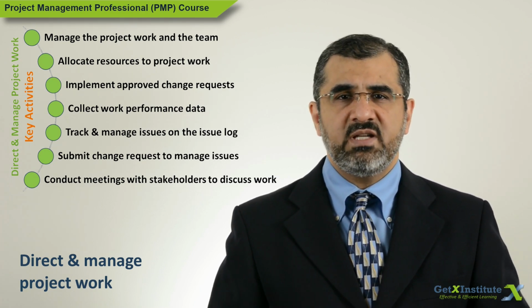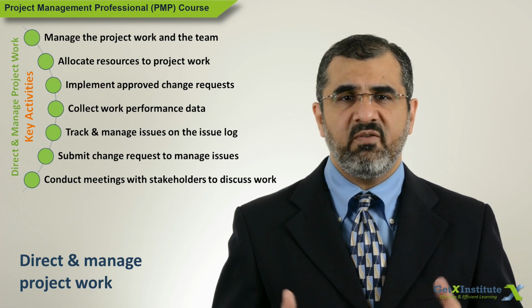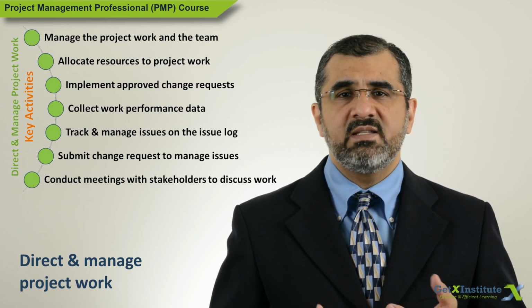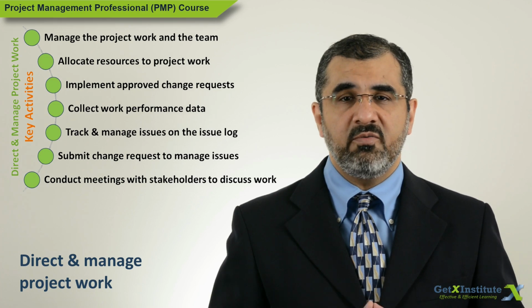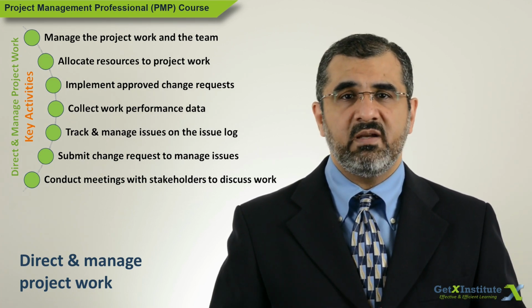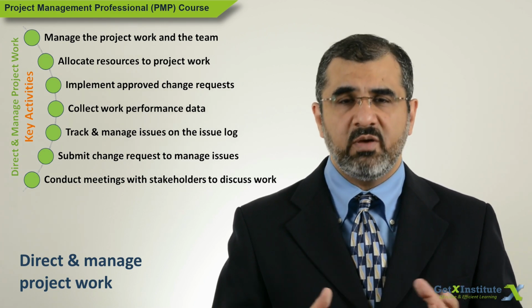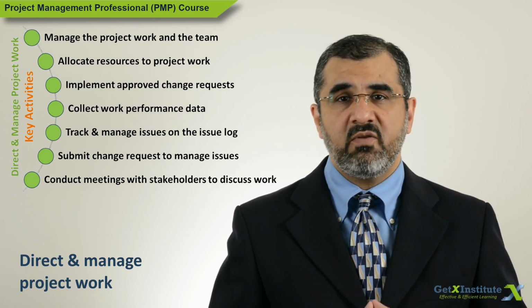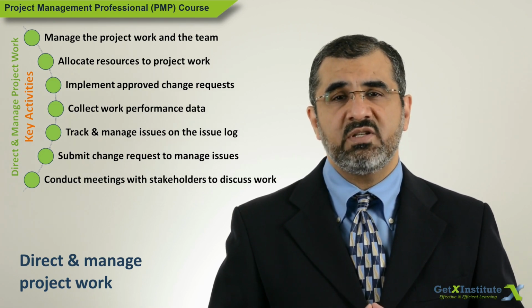On one of my projects, a seller was doing some development. There was a design requirement the seller could not do. After analysis, we found the design cannot be implemented. It was just not doable. A change request was put in to modify the design, and the whole issue extended the project by 2 months.